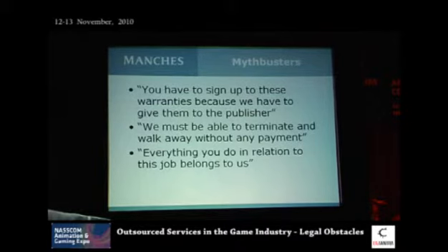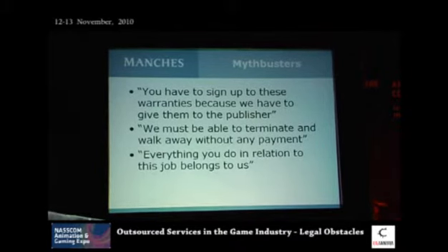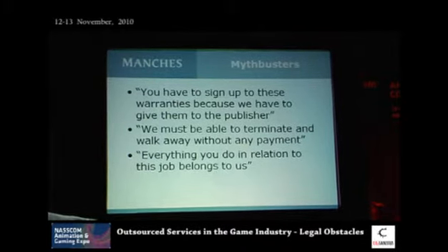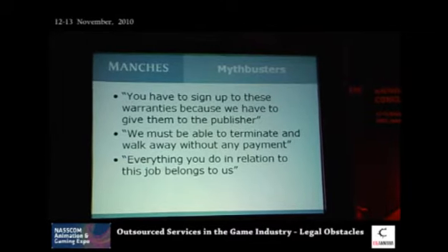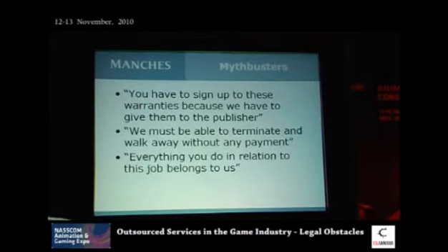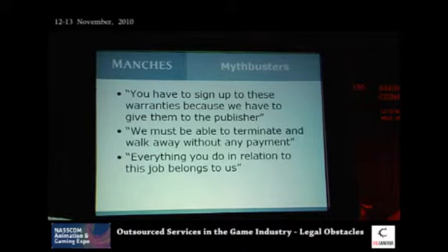However, your client can terminate. Any work that is done which your client accepts has to be paid for, whether it's formally accepted or not doesn't matter. If your client wants to continue developing it further in-house, they pay for it. It's very simple: everything you do in relation to this job belongs to us.